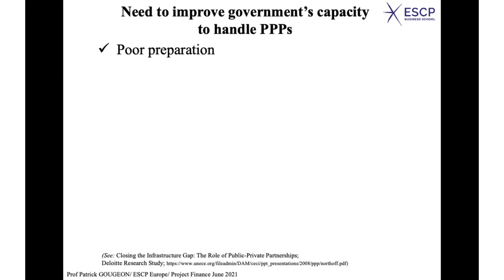If there is no expertise about PPPs in the public sector, well, that's a problem, because nobody will be able to work with the private entity, the private investors, the private partners. The project will be poorly prepared, so that the private partners will have difficulties getting the information they need to talk to their partners within the public sector, and it will end up with a very poor preparation of the project development, which is a major cause of misunderstanding and failure.